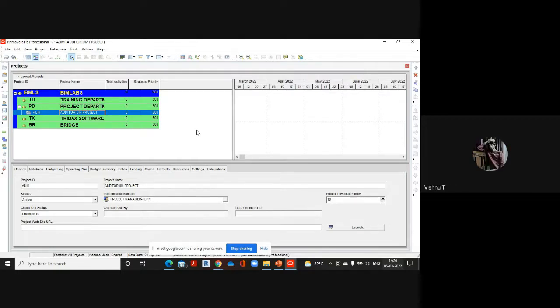Must be finished by, should we give that? No, you should not be providing that, because you will be providing that only if you have a deadline or something like that. Responsible manager, like we have created in the OBS, right? You should be selecting a person as the responsible manager. He will be having the full responsibility of the project. Next, rate type is price per unit, that is fixed. That's okay.